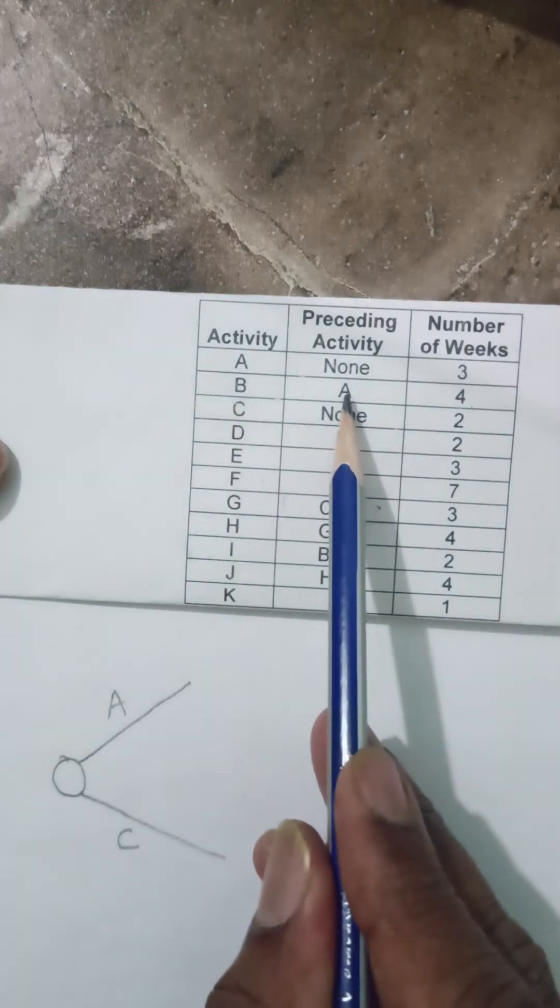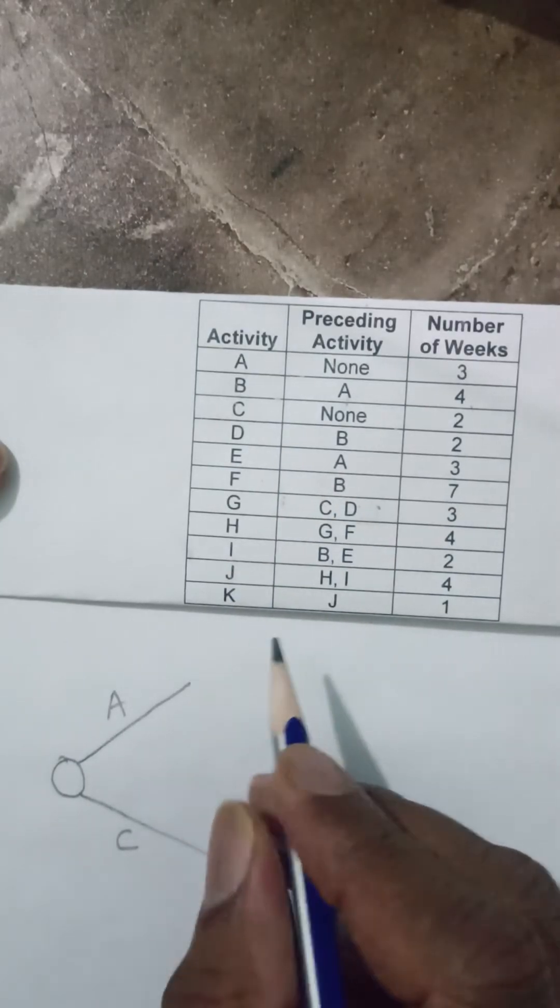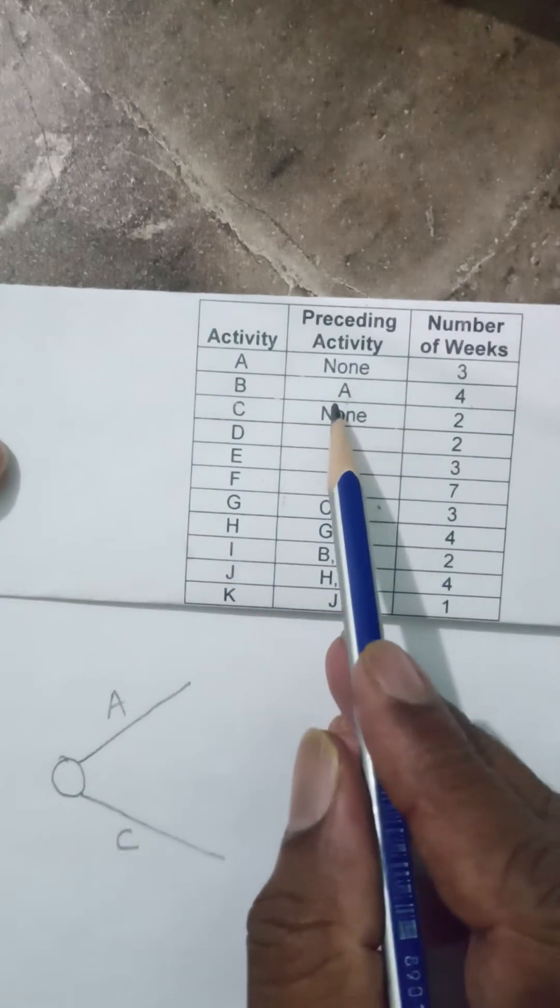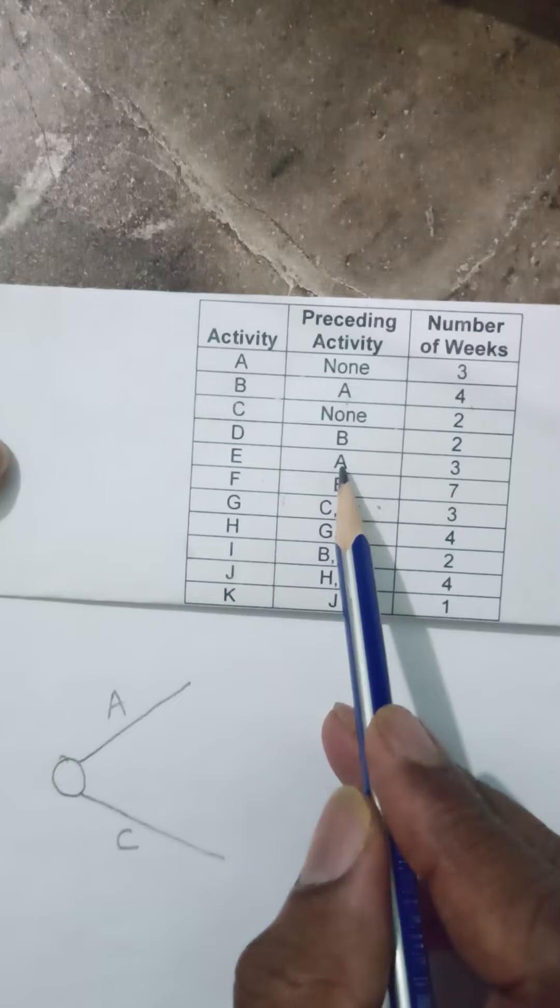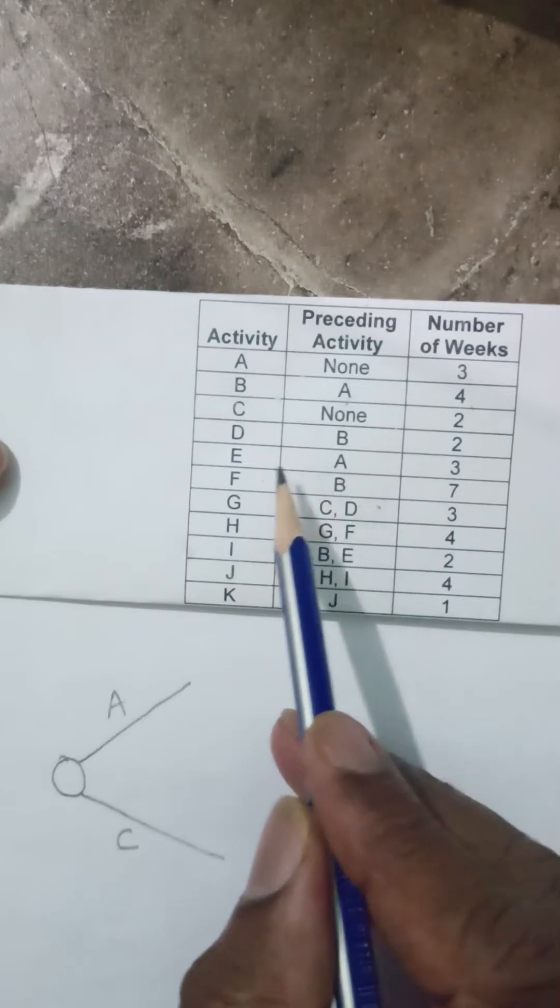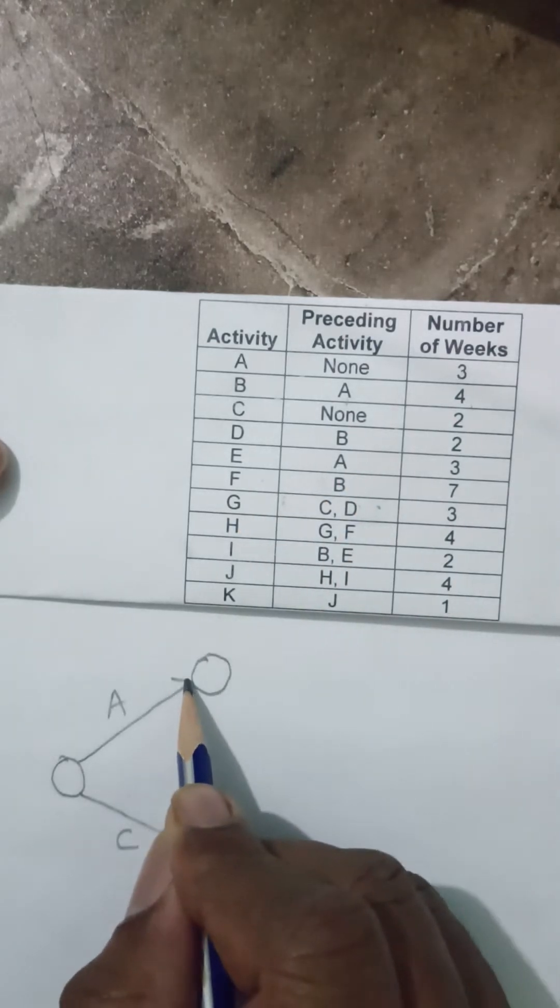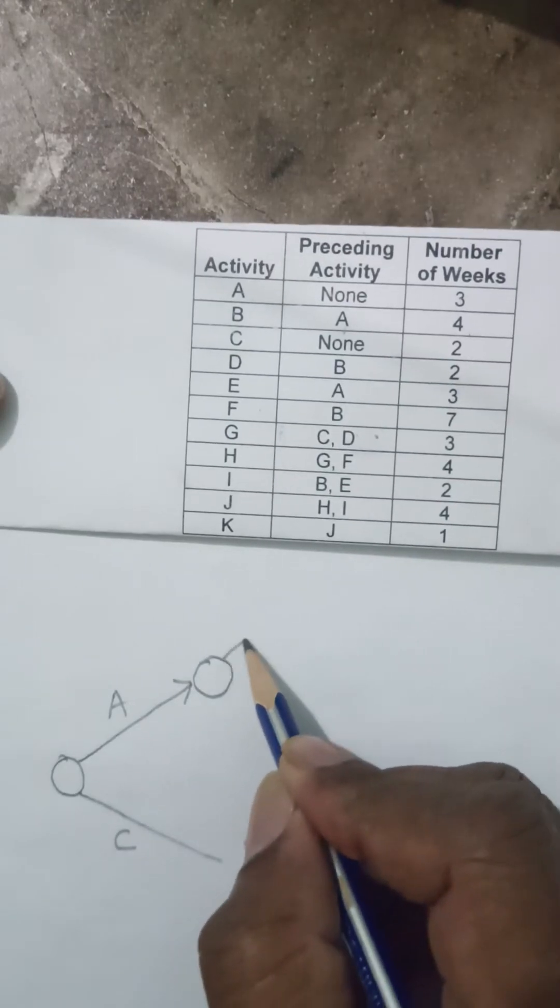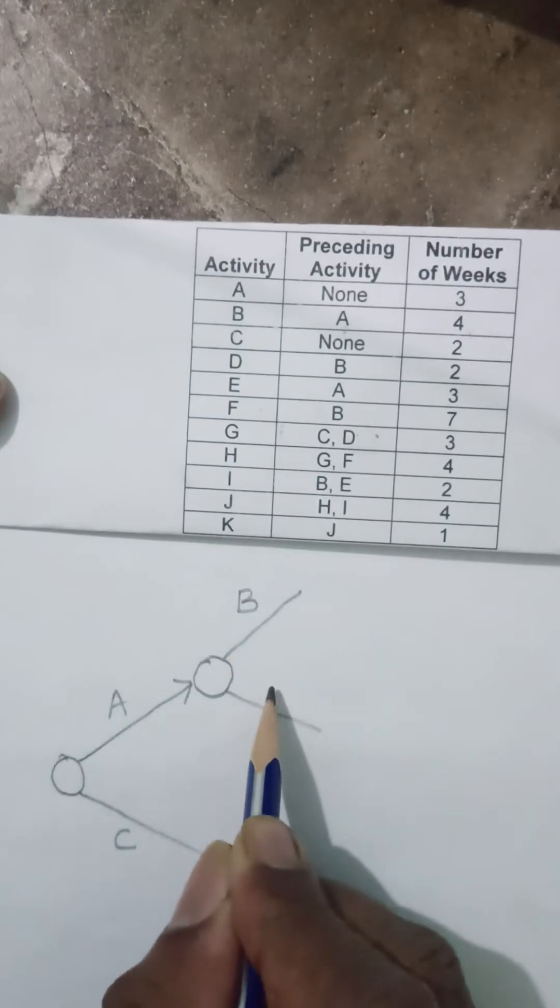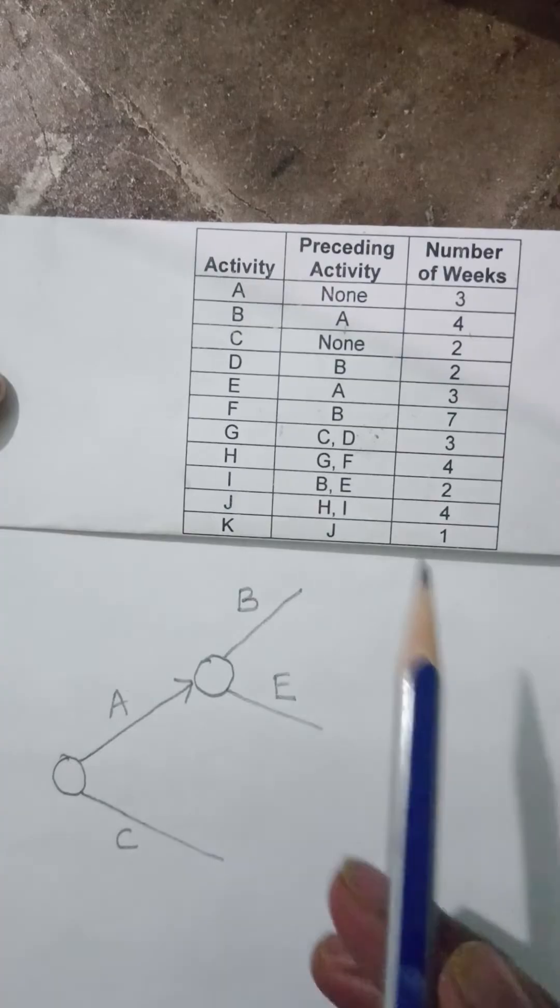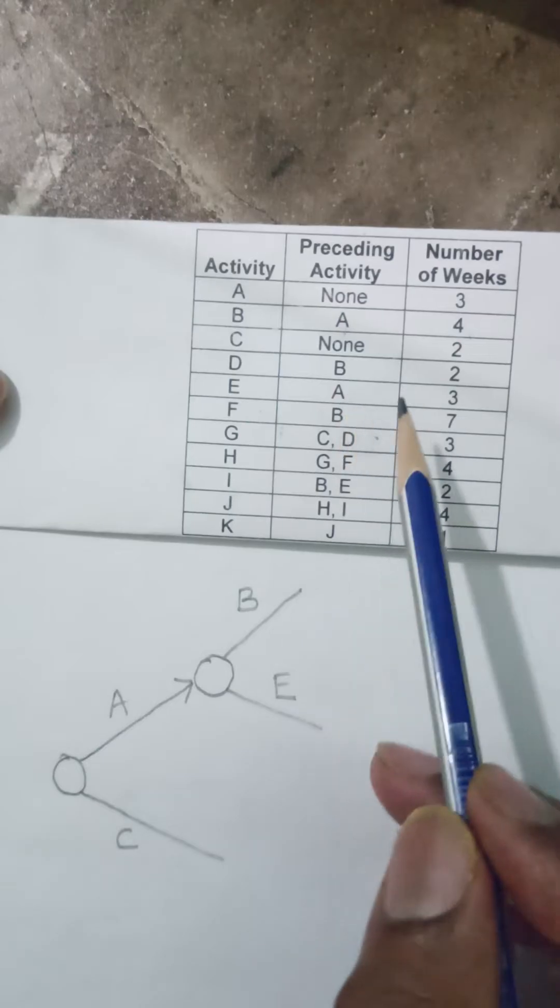For B, I have to end the activity A and start B. When I am doing that, I have to see down. There is one more activity which requires A to end, and that activity is E. So I can end this activity A and bring two arrows from it out. One can be B and the other can be E. Because there are two different activities which depend on A.